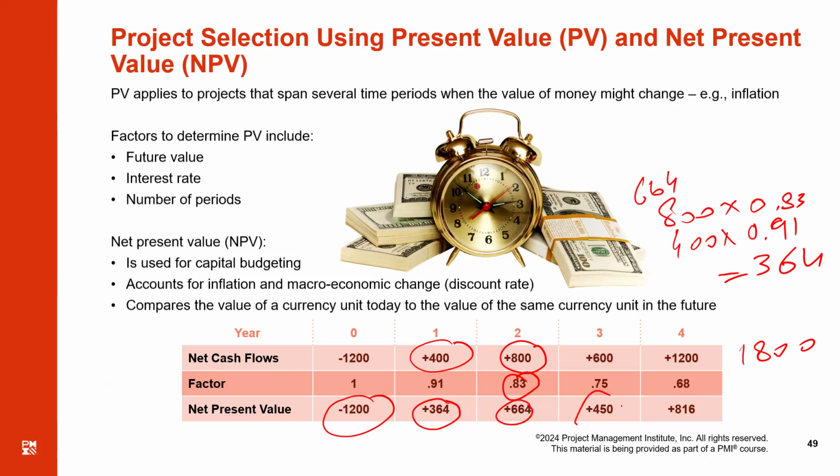So these are more realistic figures. If I add them, that will give me the net present value. This is after applying the formula I told you, or you can consult these discount factors. The advantage of having the discount factor is you simply can multiply that discount factor with the amount and you get the net present value, right?